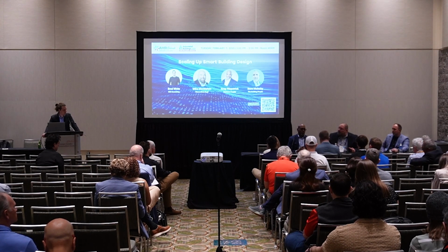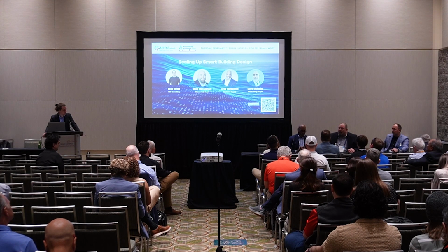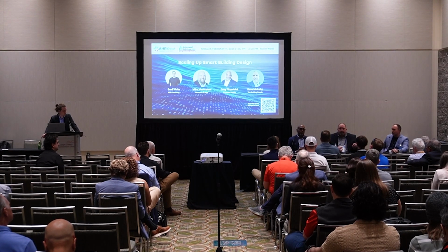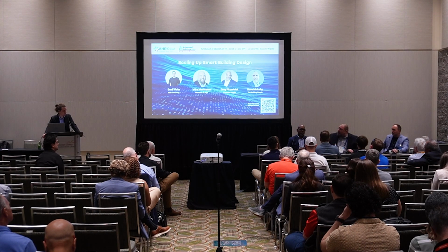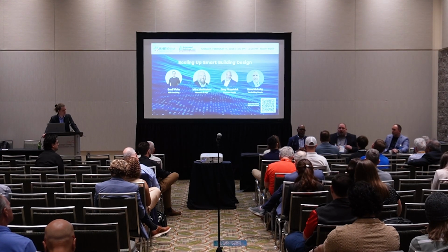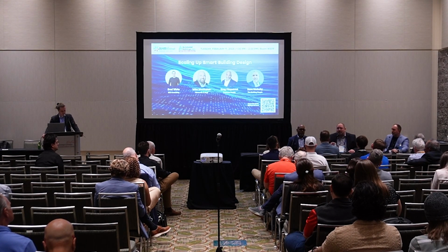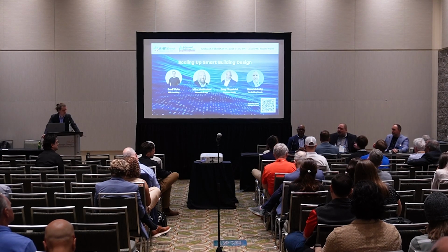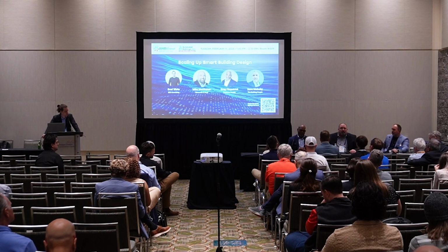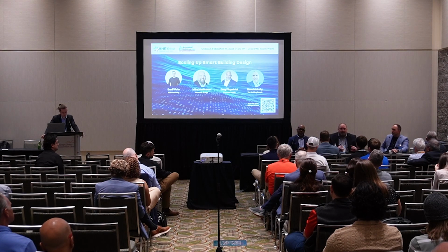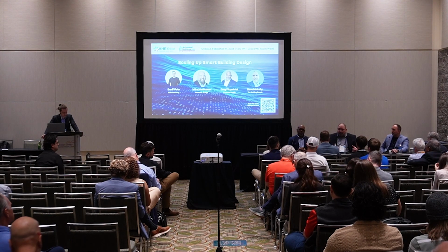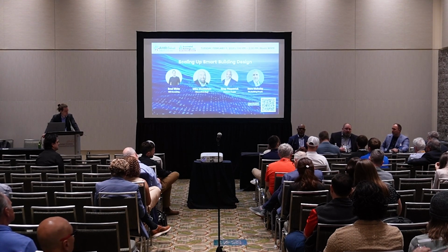If we're doing a very simple integration with controls and lighting, I need to look at the Div 23 and Div 26 spec. I need to make sure that the specification is including technology that can be integrated. Right? That's number one. What we're seeing now, though, is a lot of projects are not ready for that yet. And so how do you promote that? Now we're back to all of these silos with nobody overseeing it. So it goes back to education, right? It goes back to the owner. It goes back to the OPR, right? Owner's project requirements. That's another vehicle for delivery, so that you can capture that information for the design team to be able to follow. That way you're prepared for integration.